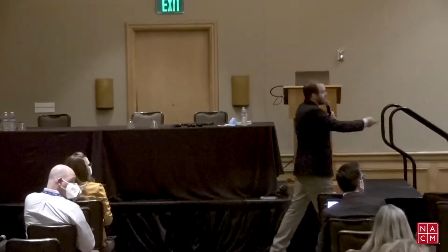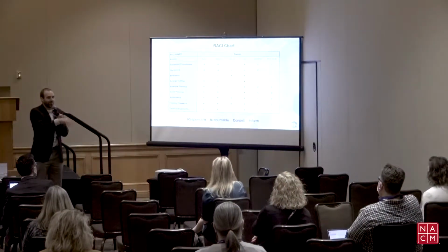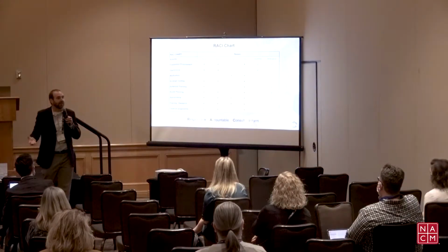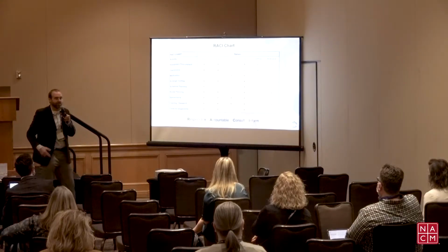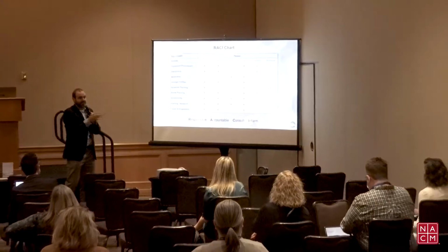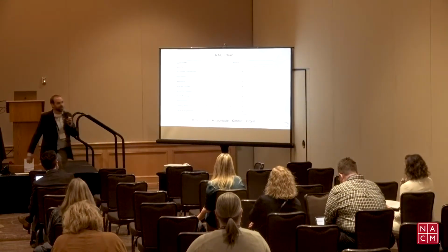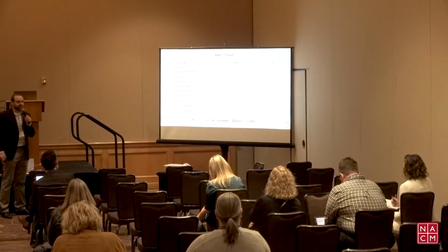So, any other comments on this? Well, in general, you can have an A/R, but the accountable person shouldn't be the person doing the actual work. They should be managing it to make sure it's getting done. And that's the difference. We have a small team here. You could have 50 people, so you might have a lot of people working on that activity and one person making sure it's moving forward. So that's the difference. You have one A, and as many R's as needed.